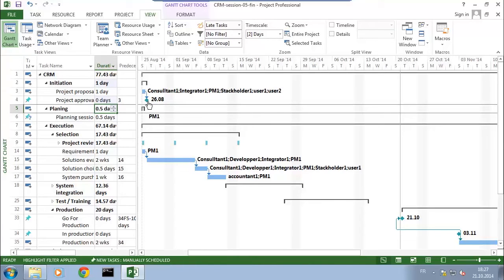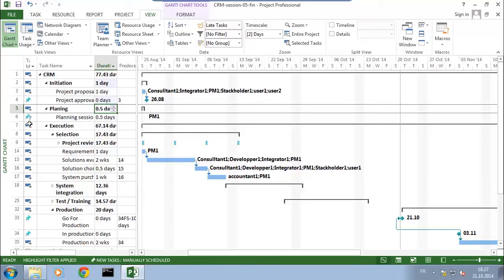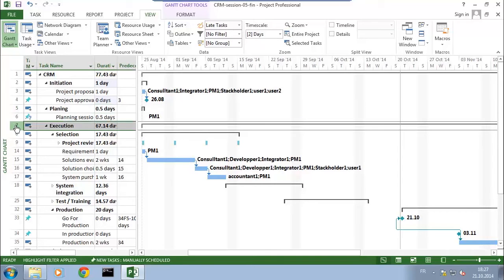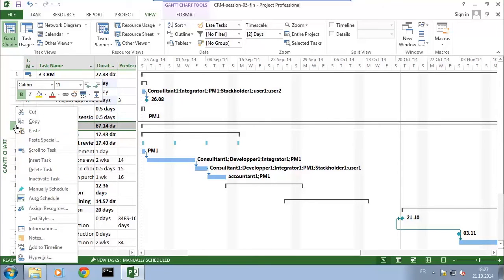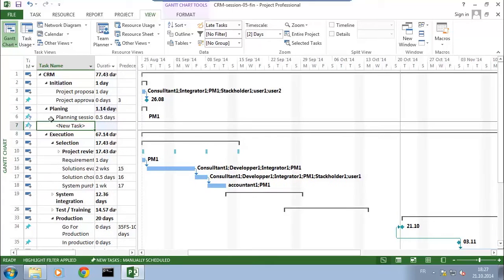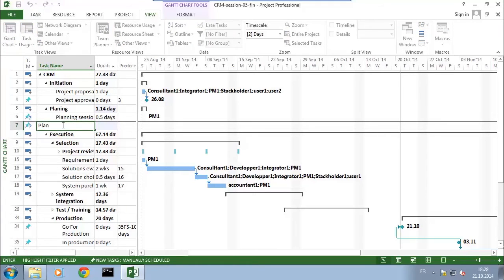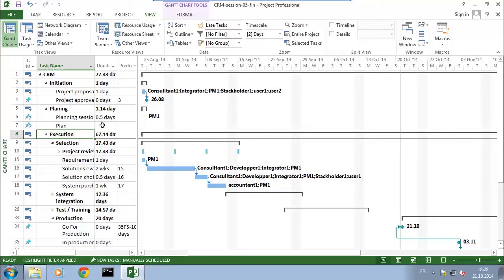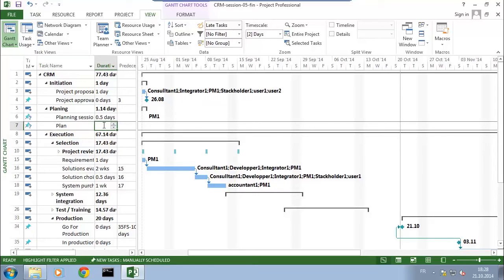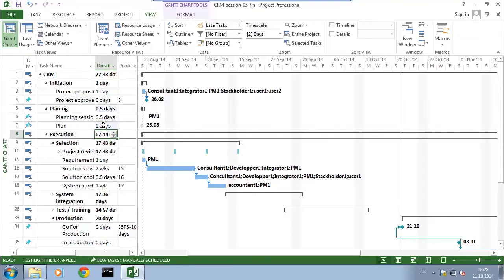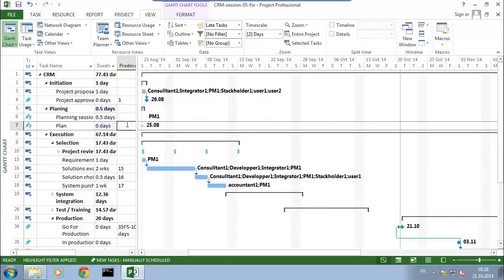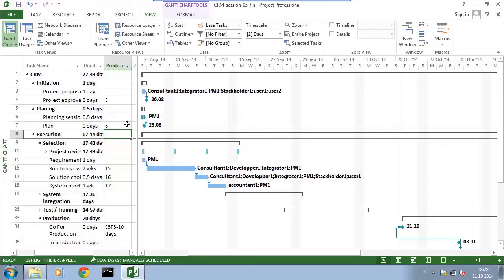What I intend to show is an important date - when our project is going to be approved. I'll add another milestone below in the planning because milestones can also be used for deliverables. I'll insert a task which is the plan itself, meaning I have a deliverable which is the project plan. I'll entitle this 'plan' and set the duration to zero days. This will be done once we went through the planning session, so the predecessor is number six.